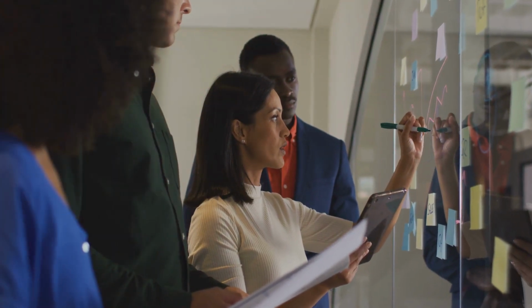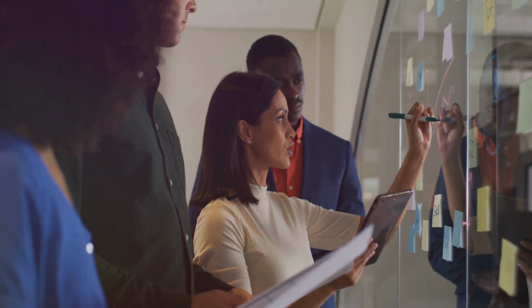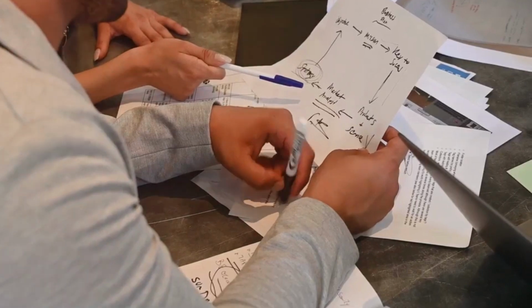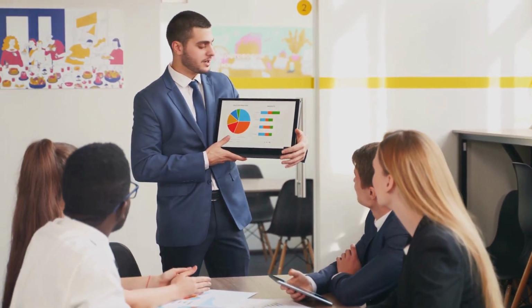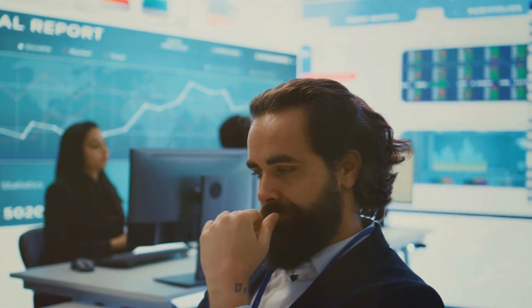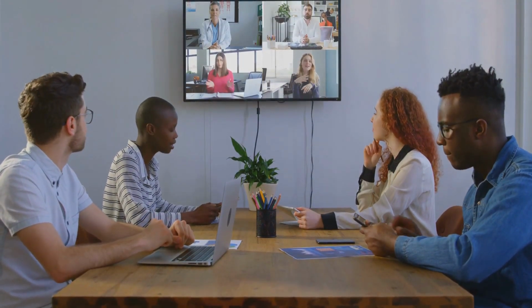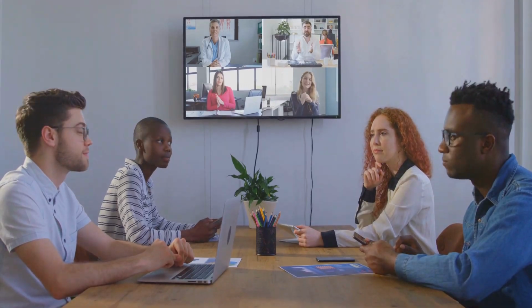A good epic structure typically includes 5 components: a short, clear title, a description or narrative explaining the purpose, the business value that justifies the investment, acceptance criteria that define done, and a list of potential capabilities or features that can be derived from it.